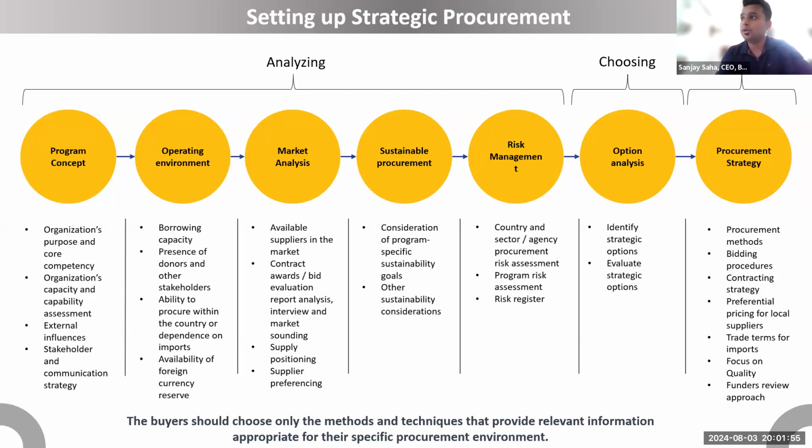And then you can add certain time for managing risks. So risks, security and all that. So maybe another 3 to 6 months, depending on whether it is a high risk or a low risk or whatever. So anything between 1 to 1.5 years, I would say in most cases for a country like Nigeria, even if you are doing it at a state level, I would say minimum 1 year of a time horizon that you need to take into account.